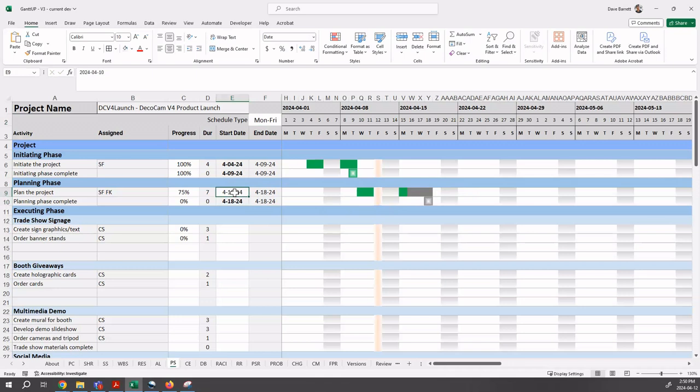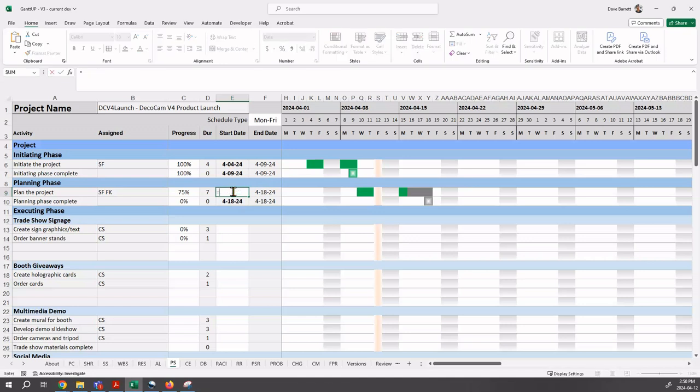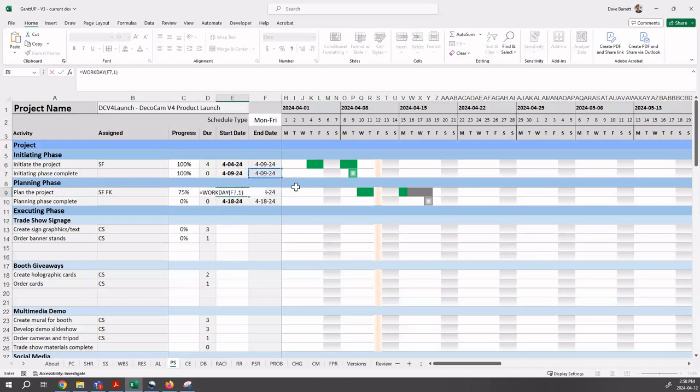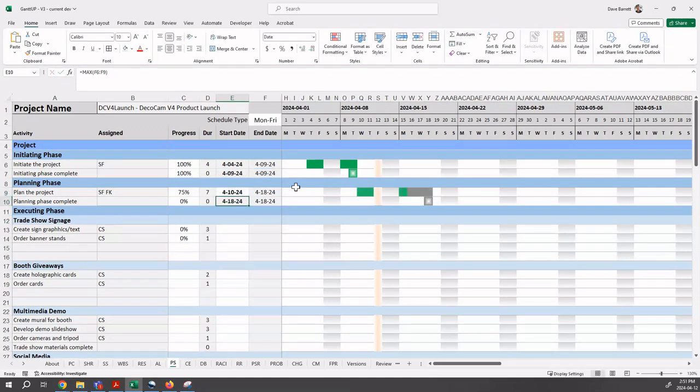Now it's important in this case, you do it differently. So instead of just saying equals F7 plus one, we now enter a different type of formula. We actually have to enter what's called an Excel function. And the function is the workday function. We say equals workday, left bracket, the date we want to attach to, which is F7. And then instead of plus one, we say comma one. And now it'll choose the next work day. If the next day after, if this was on a Friday, it would choose the following Monday. It would be smart enough to do that.